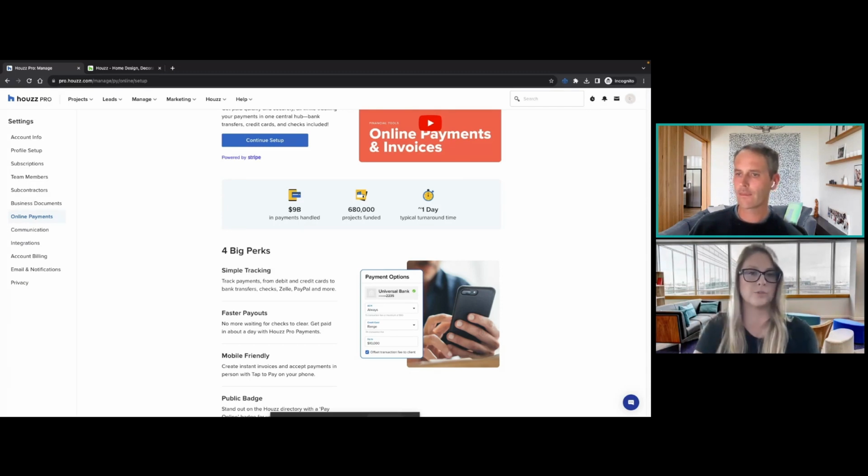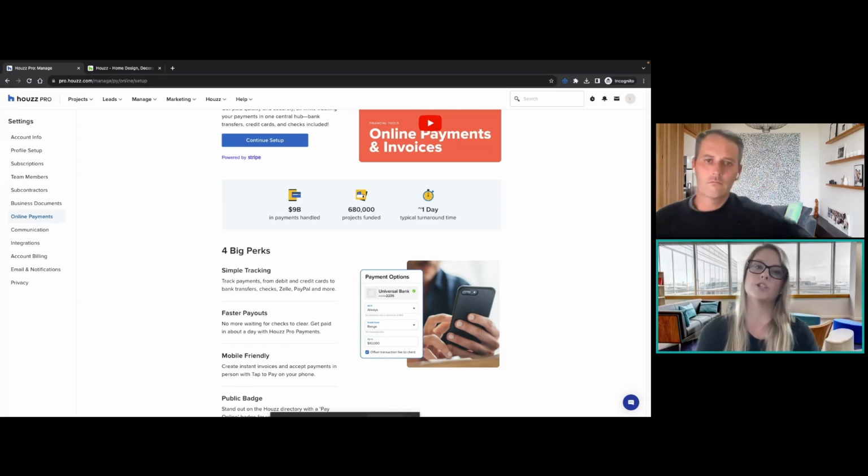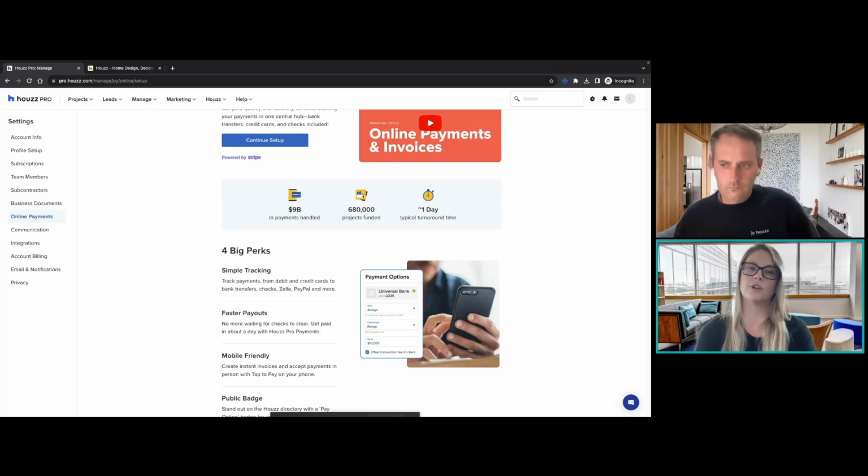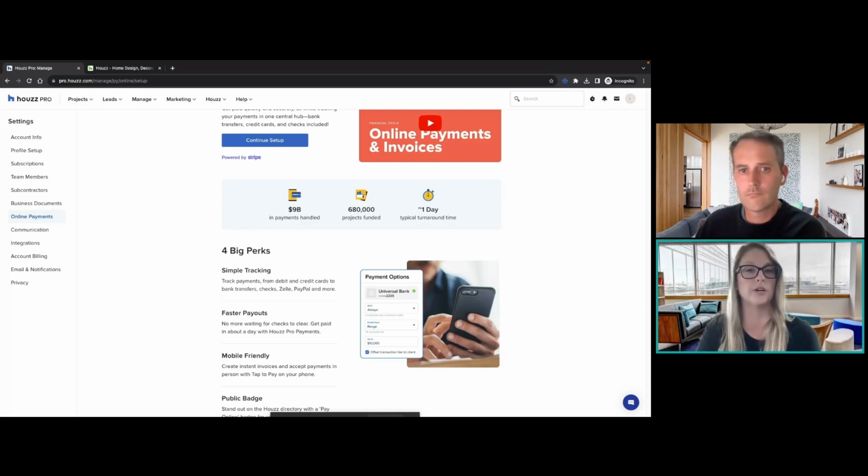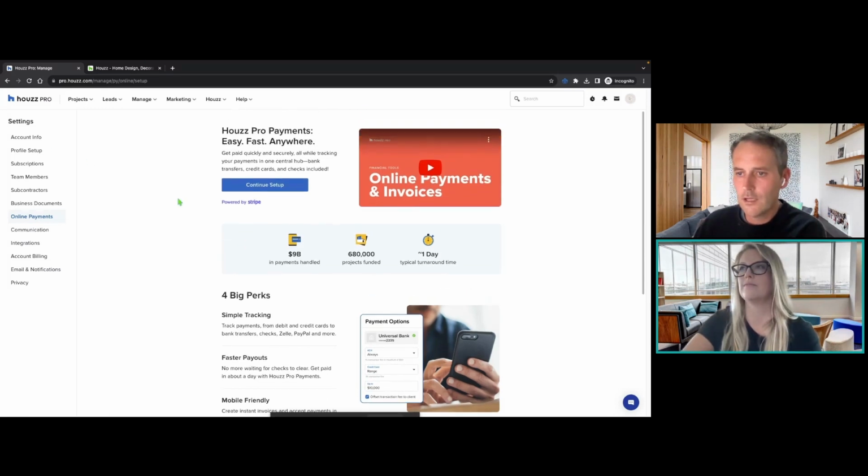You just go to the estimate that's approved, select what you need to change, and create that change order as I showed. It will not update the original estimate. So if you'd rather go back and reopen the estimate for editing and reflect it there, that would be your secondary option to utilize. But the change order will be linked to both the estimate and the invoice so that you have that paper trail. Great questions.